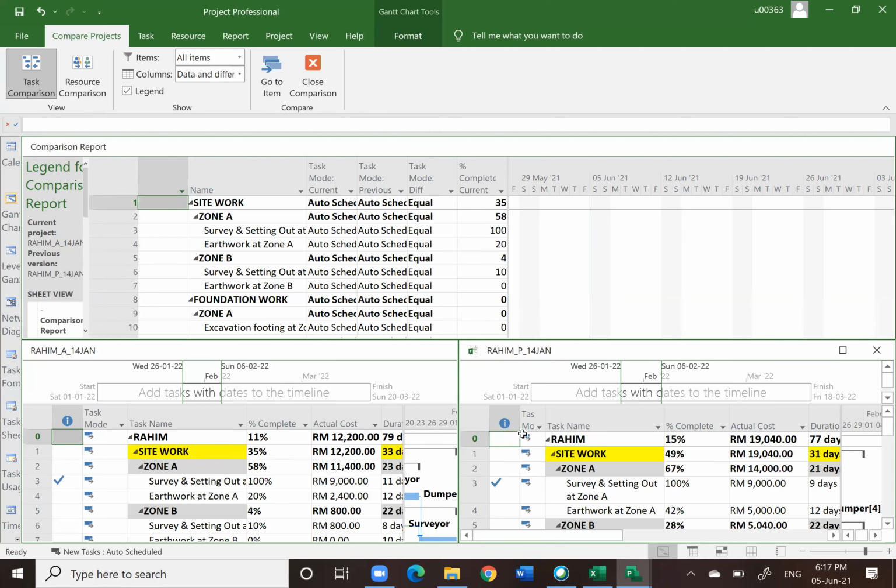So that is the reason why we basically save file into different date. We call it folder management in order to trace back what could be the issues. If you do not do that, then basically there is no way that you can compare. There is nothing wrong not to compare, but that is the concept anyway.